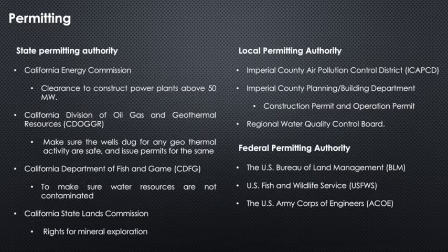Geothermal power project permitting varies from that of other thermal power plants. The Energy Commission conducts an environmental analysis of the project as a whole and permits all but the geothermal wells, pads, and pipelines, which are subject to permitting by other agencies. Both the production and injection wells are permitted by Department of Conservation, Division of Oil, Gas, and Geothermal Resources. The well pads and brine pipelines are permitted by Imperial County. Both agencies intend to use Energy Commission's final staff assessment as the CEQA document for their actions.